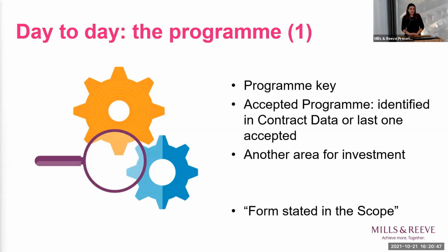Final area I'm going to look at is the programme. Particularly under the engineering and construction contract, it's absolutely key that the programme is looked at properly and runs properly. Note that there's a definition of accepted programme in the contract, which says it's the one identified in the contract data or the last one that's been accepted by the parties. And I think Stuart will come on and talk about this in more detail. This is an area for clients where they need to make sure that their professionals have the resources they need to be able to advise on this properly, and for contractors to make sure the programme works robustly so that you can recover your losses later on.